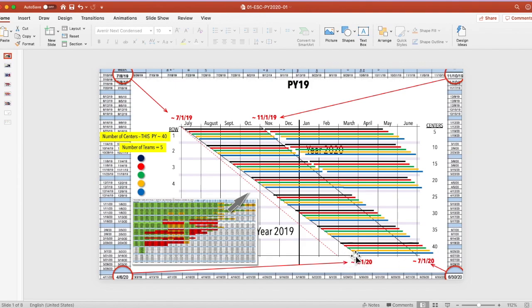So it seems, because we have no more room to go that way, we push into this zone here. And that is why this wedge, or this sort of shape that I've created, this line is actually a parallel line to this other line. And I've placed it there to suggest that we really need to get all of these surveys done, started, and completed in no more than 8 months. July, August, September, October, November, December, January, February. Beginning of February should be when a survey already returns home from their center facility survey. That would afford them that same 4 months.